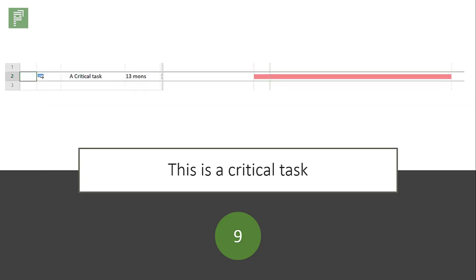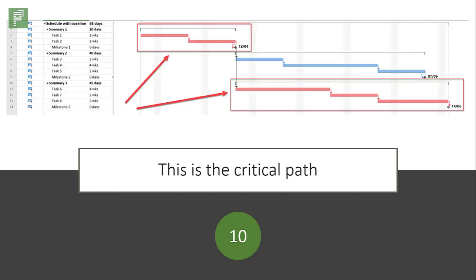This is a critical task. This is the task if that moves, the whole schedule is affected. Make this task your priority.